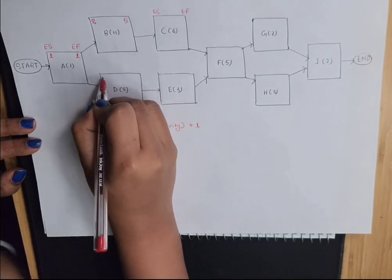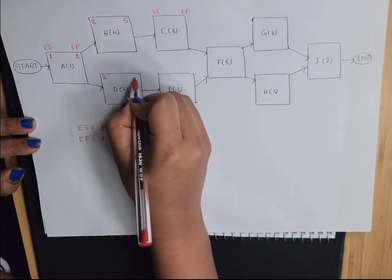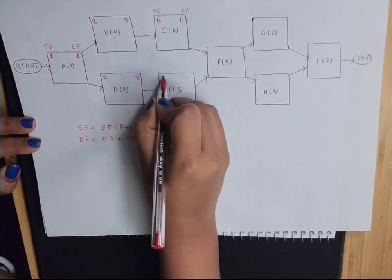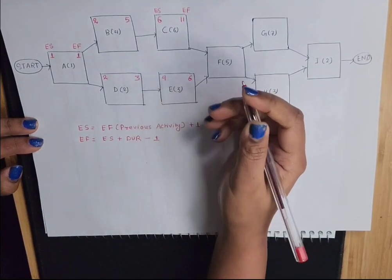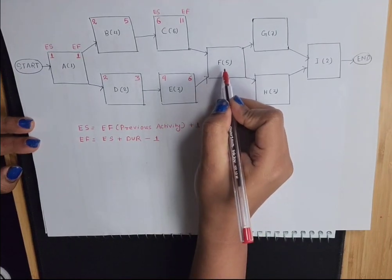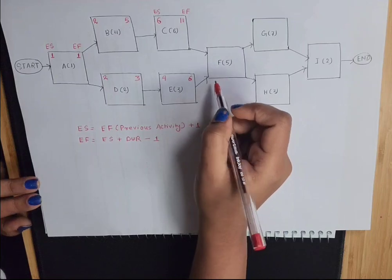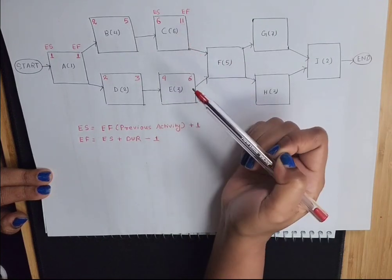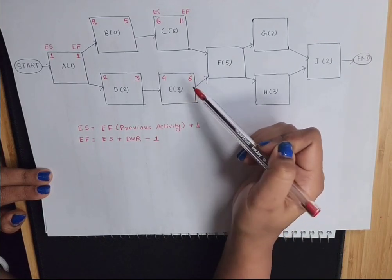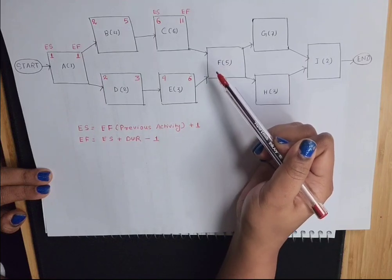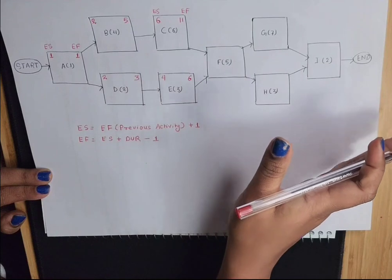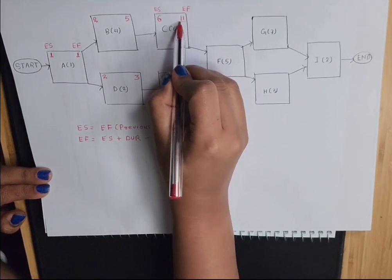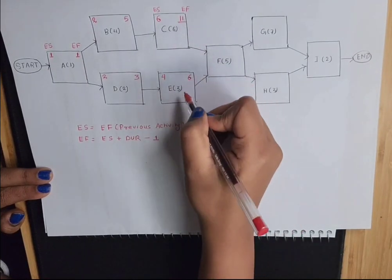For activity D, early start is 2 and early finish is 3. Further along: early start 6, early finish 11; early start 4, early finish 6. Now you have to be very careful when calculating early start and early finish for activity F. Activity F is connected to activity C and activity E. Activity C finishes on day 11 and activity E finishes on day 6. During the forward pass, you always take the larger number — here 11 is greater, so we take 11 and discard 6.